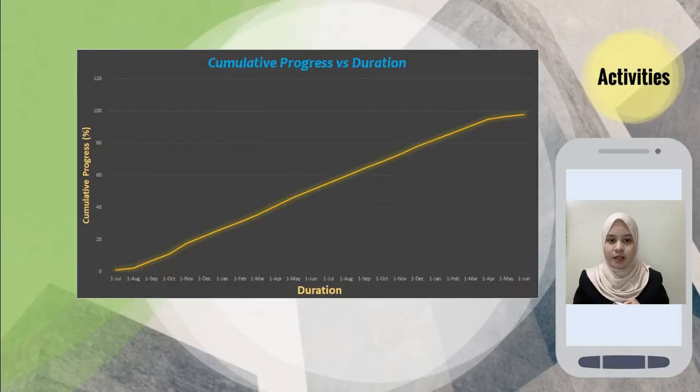The figure here shows a result from the S-curve analysis. The S-curve is commonly used in project planning. It is normally used to measure progress of work, evaluate performance by comparing the actual and planned, then make cash flow forecasts. As you can see, in the beginning of the project, the progression is low. As resources are added and the project is in execution, there is a rise in the cumulative duration. Towards the end of the project, the duration of work tends to level off as workload decreases and resources are released.